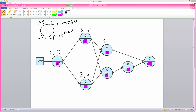The same thing for activity five. Both activities two and three must be finished before five can begin, so we pick the higher of the two. Five plus one is six, and five plus three over here is eight.